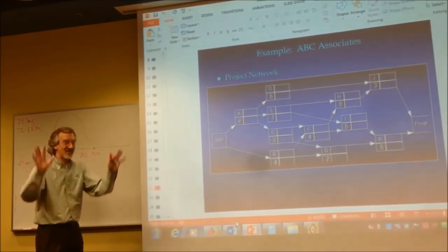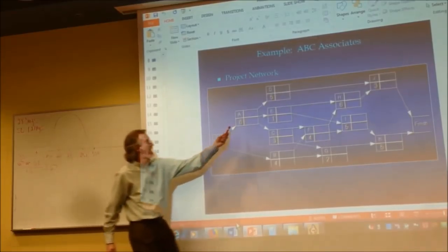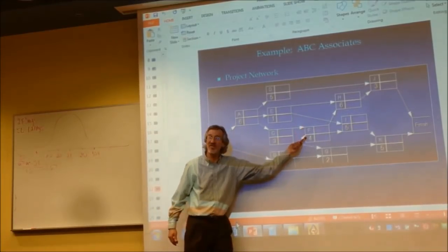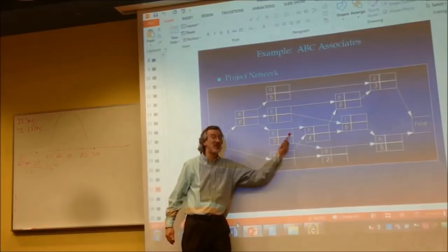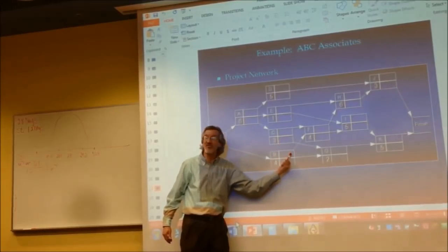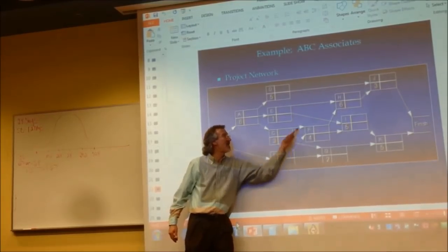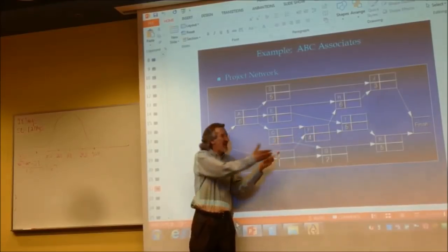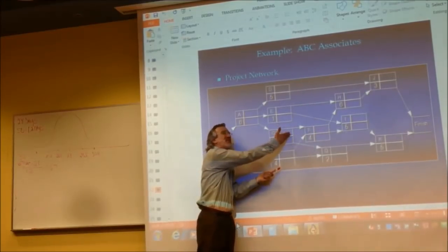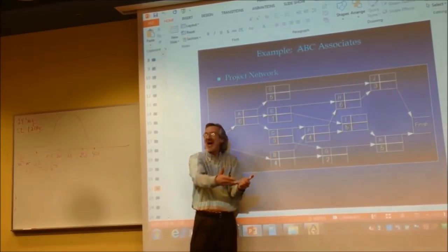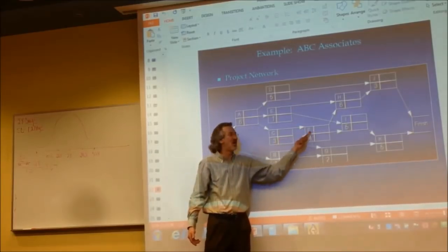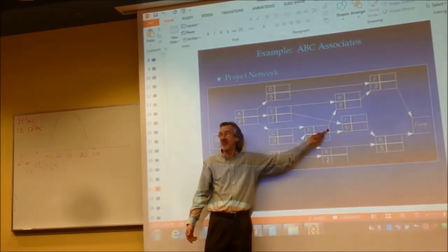Eric, okay, thanks. 9. Because it's preceded by 2 different activities. C's earliest finish is a 9. B's earliest finish is a 4. Both have to be done before F starts, so even if this finishes at 4, it's got to wait for this one to finish, which is 9. 9's the earliest start. Add 4, we're at 13, right?